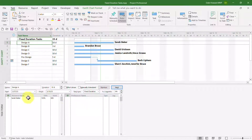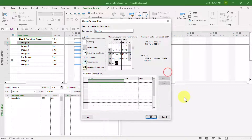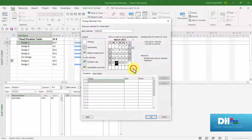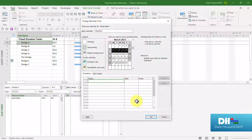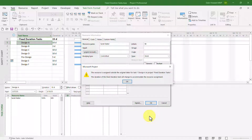To demonstrate this, I'll double-click the name Sarah Baker in the task form pane, and then click the Change Working Time button. On her calendar, I'll scroll to the month during which she's requesting PTO and mark the dates — March 6th through the 10th. In the Exceptions grid, I'll type in that this is PTO and click OK. Notice that Microsoft Project displays the warning dialog telling us the duration of this fixed duration task will change.